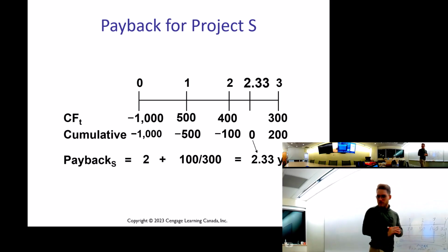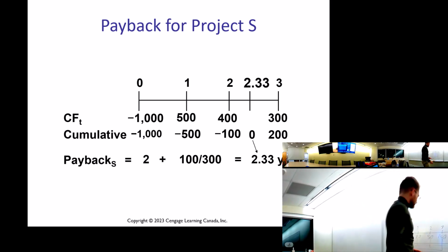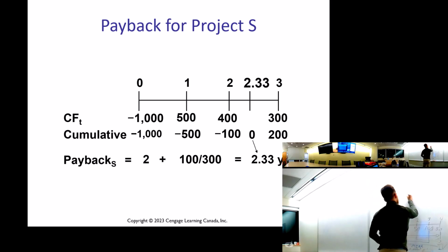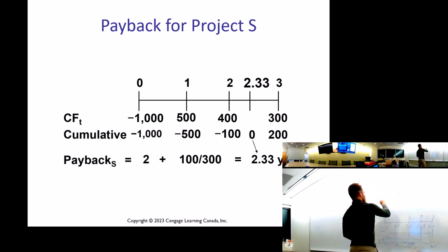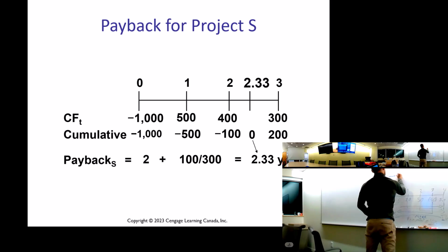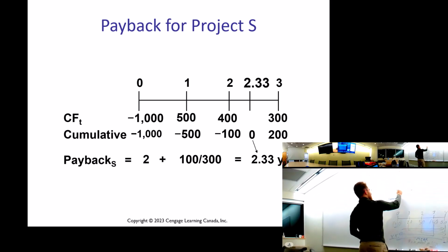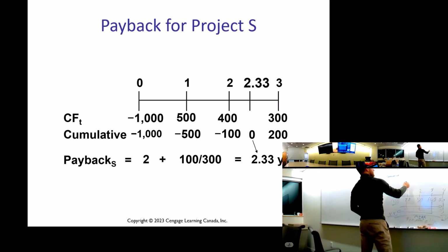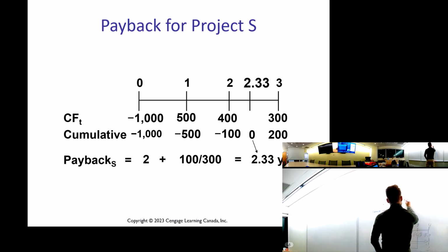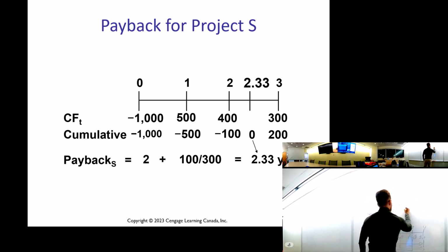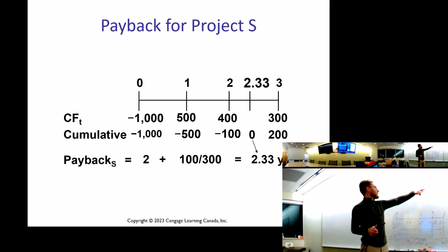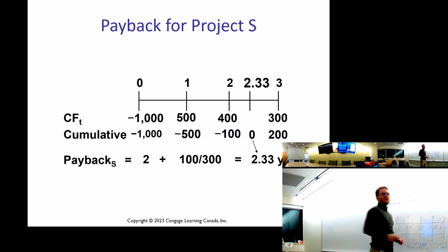Okay, so where's my fancy blue marker? There it is. So in this case, I earned $500. So this $1,000, right? My cumulative. I basically go this $1,000 here, and then I add on the $500. I still have a $500 deficit. Then I earn positive $400, right? I add that on. I'm down to a $100 deficit now, because 500 plus $400 is $900, right? 1,000 minus $900 is $100. That's my current outstanding deficit, right?